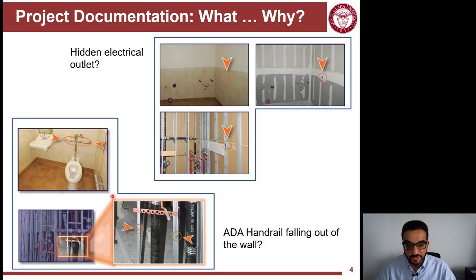Sometimes you expect your studs to be within a specific interval, but in this case you can't fix the handrail. And if you go to the pictures, you can see the studs here are a little farther apart than usual, and you need to then take specific measures here, and that comes with a cost, and you can discuss who will pay for these.